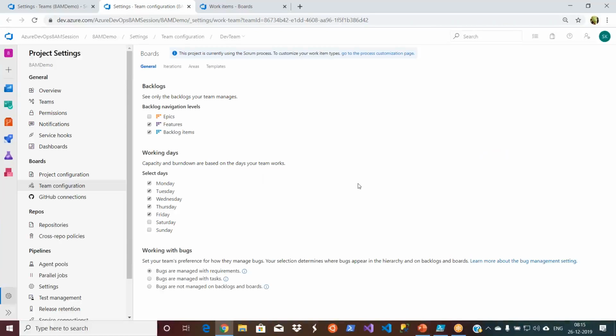So first, if you are working for Middle East companies, your working days will be till Thursday. Friday is a holiday there. Friday, Saturday. For the rest of the other countries, it will be Monday to Friday. So if you want to define your holidays or working days, you can define here, because all these are very important for you, because based on these settings, your project report will be publishing actually.